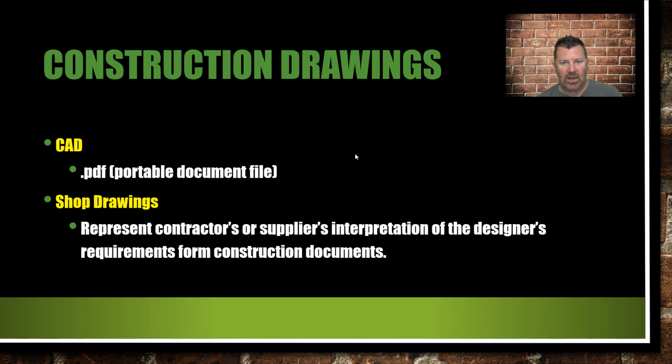The architect has designed it by looks, but they need to get that steel beam engineered. And so these drawings would be sent off by the landscape contractor, the one that's putting it up or building it, or the GC, and they would actually get this spec'd, and then it would be approved by the designer. So you've got to have those shop drawings on certain things. Not everything that we do, but every once in a while we'll have to.